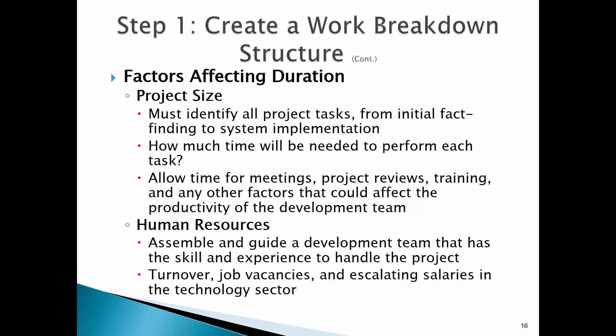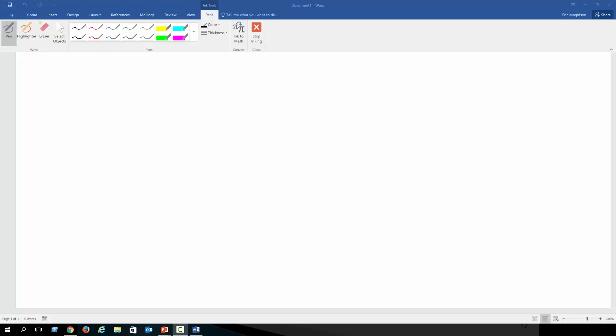Keep in mind that if this is a person in your organization who already has a job, a one person day may be that we're committed to working on this project two hours a day. Things that affect duration - certainly project size. As a project grows, the demands on the project, the demands on the people grow exponentially. I'm going to show you how the complexity of a project grows.